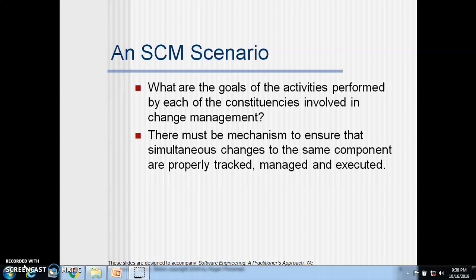In the scenario, assume that the product is a small one involving about 15,000 lines of code being developed by a team of 6 people. At the operational level, the scenario involves various roles and tasks. For the project manager, the goal is to ensure that the product is developed within a certain time frame. Hence, the manager monitors the progress of the development and recognizes and reacts to problems. This is done by generating and analyzing reports about the status of the software system and by performing reviews on the system.